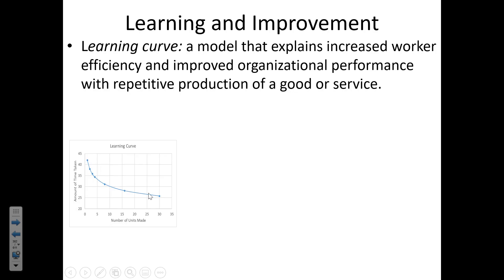The learning curve is a method of explaining improvements to efficiency and projecting them to include in your cost estimates. Chapter 15 is all about trying to predict how much things are going to cost before you're actually doing them. In class on Monday we talked about the unit method — for example, finding the price per ton of steel and the cost of shaping it into a pipe section to estimate total cost. But the more something is done on a construction site, in a factory, or when applying services, people get better and better, so you need an approach for taking those productivity improvements into account when you estimate costs.